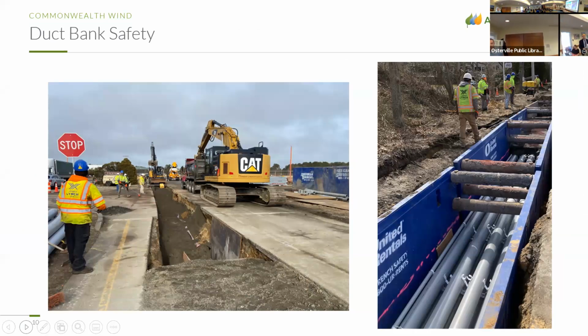We are going to keep the operations of the horizontal directional drilling within the paved surface of the parking lot. Construction will not veer into the protected resource areas, into the marsh and the wetlands, into the dunes. We're going to keep the operations only within the paved parking lot. So whether it's the entrance channel into East Bay or East Bay, and the other protected resource areas surrounding the parking lot at the beach, we're not going to have any operations in those.